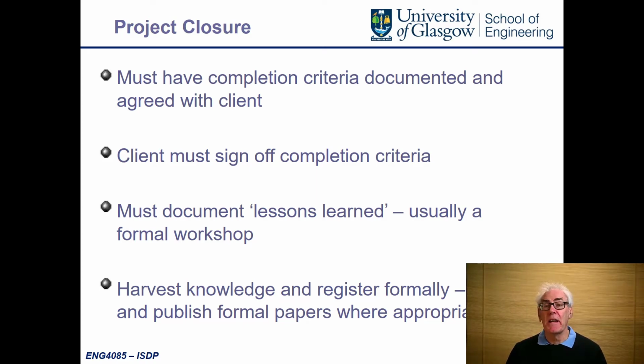The client must sign off on all the completion criteria. If you said a piece of electronics has to achieve a certain performance, if that has been achieved, then the client has got to sign off and say, yes, it works and it meets the specification. Be wary, clients may try to change their mind. This is why it's important to write it down at the start of the project so that it's very clear